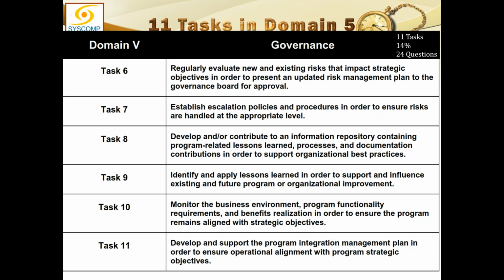You have identified a risk in your program, or for that matter, let me say that one of your project managers has identified a risk which he feels, though he has identified it, is not really applicable to him. That is a higher level risk, and probably it has to be escalated up to the program manager. So the risk was identified by the project manager, but he has escalated it to me, and I have taken over that risk because that applied to the program more than the project.